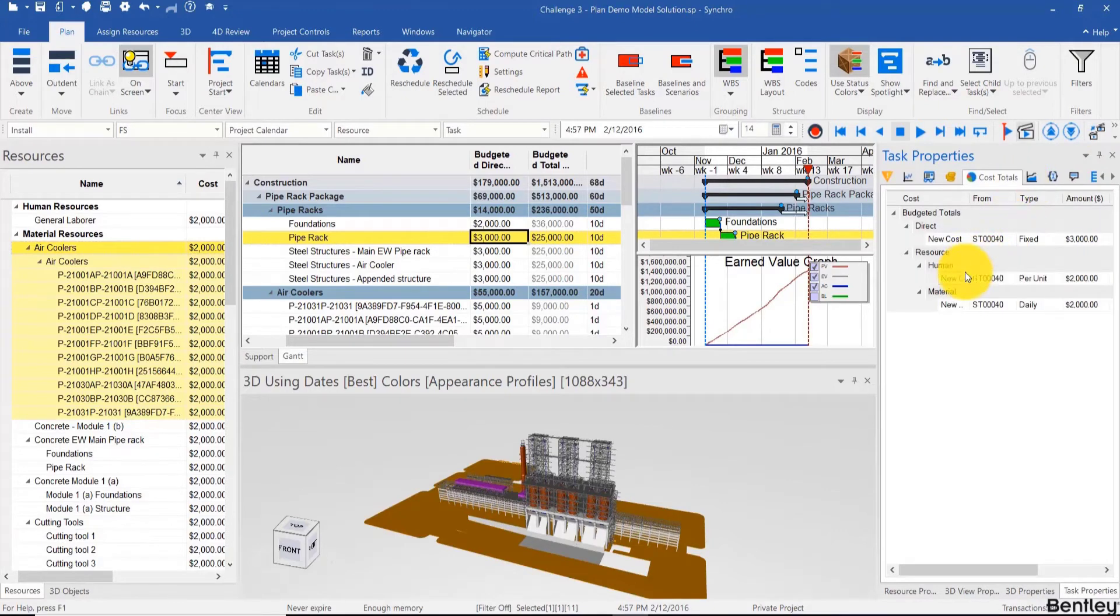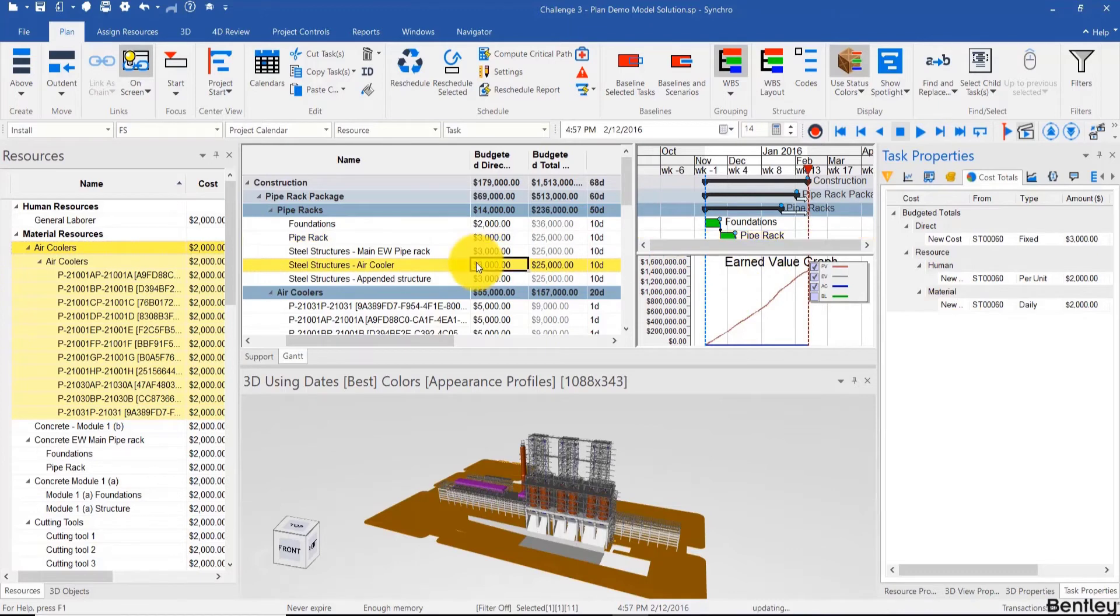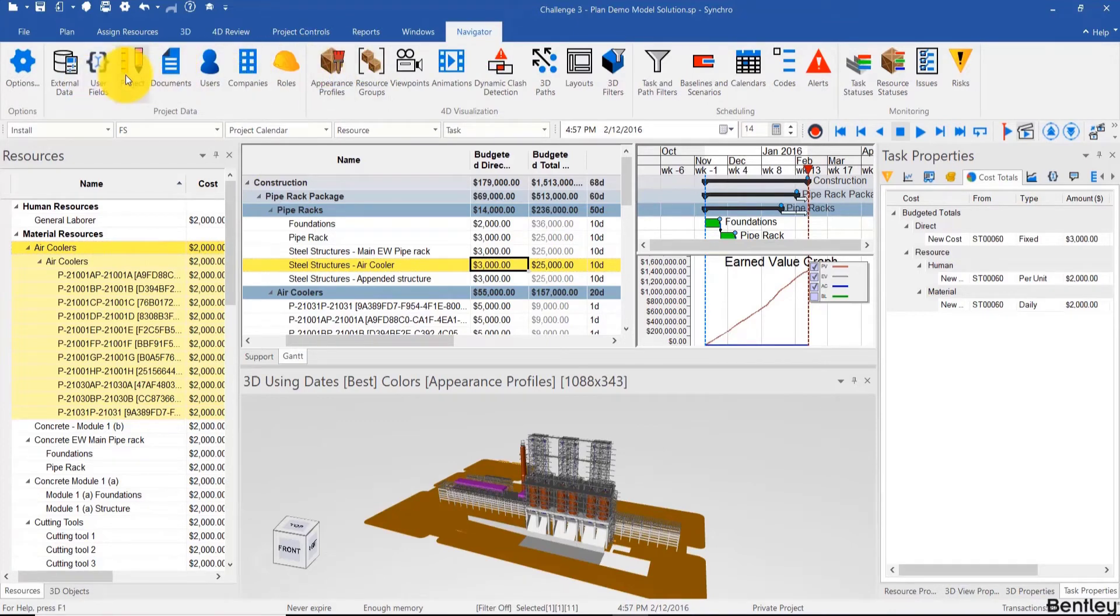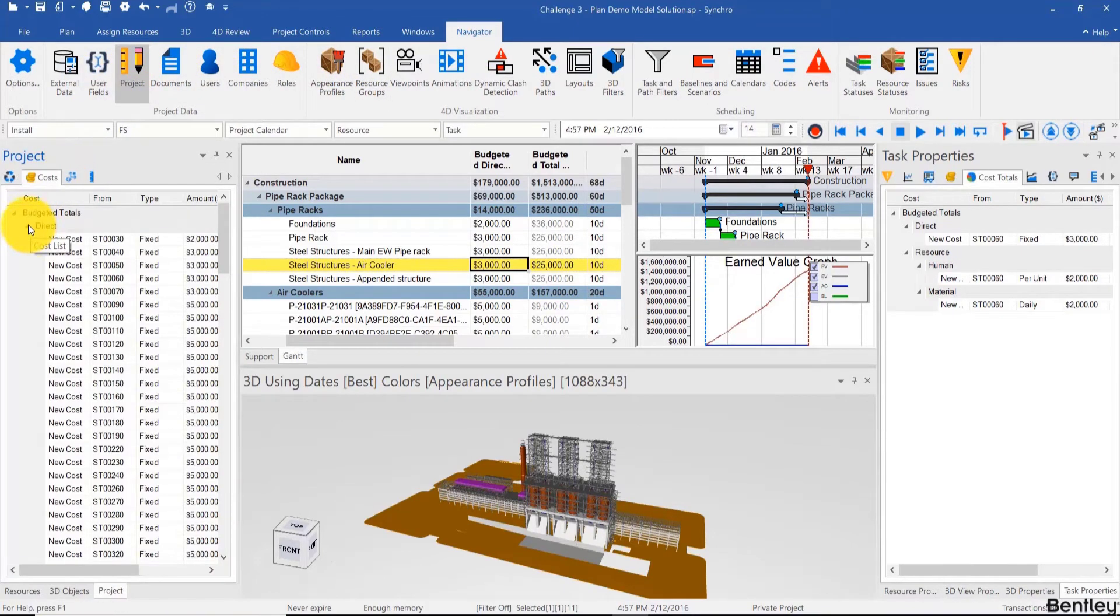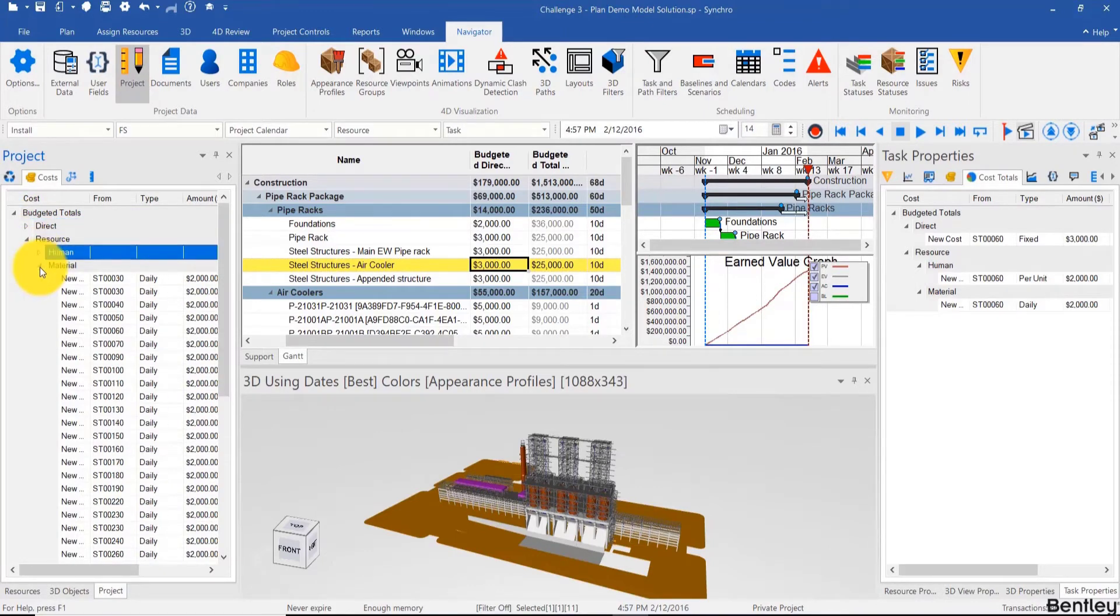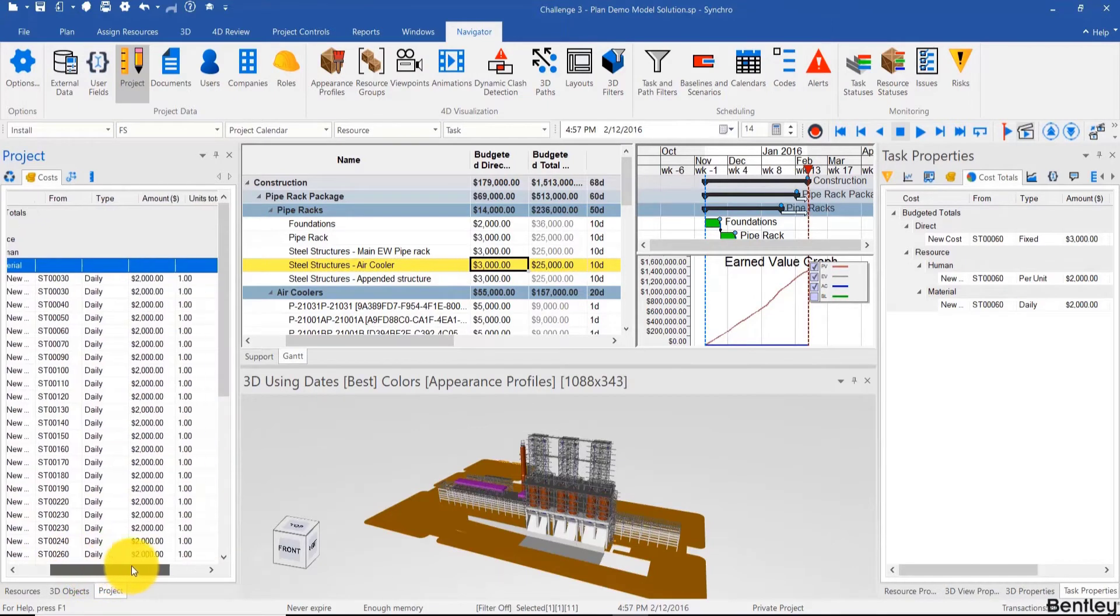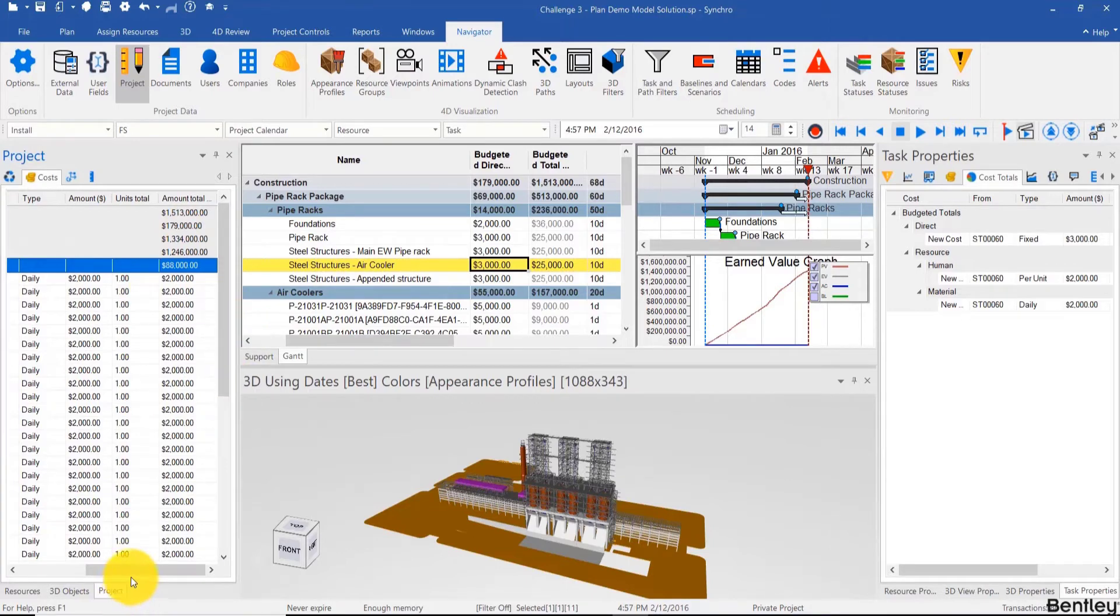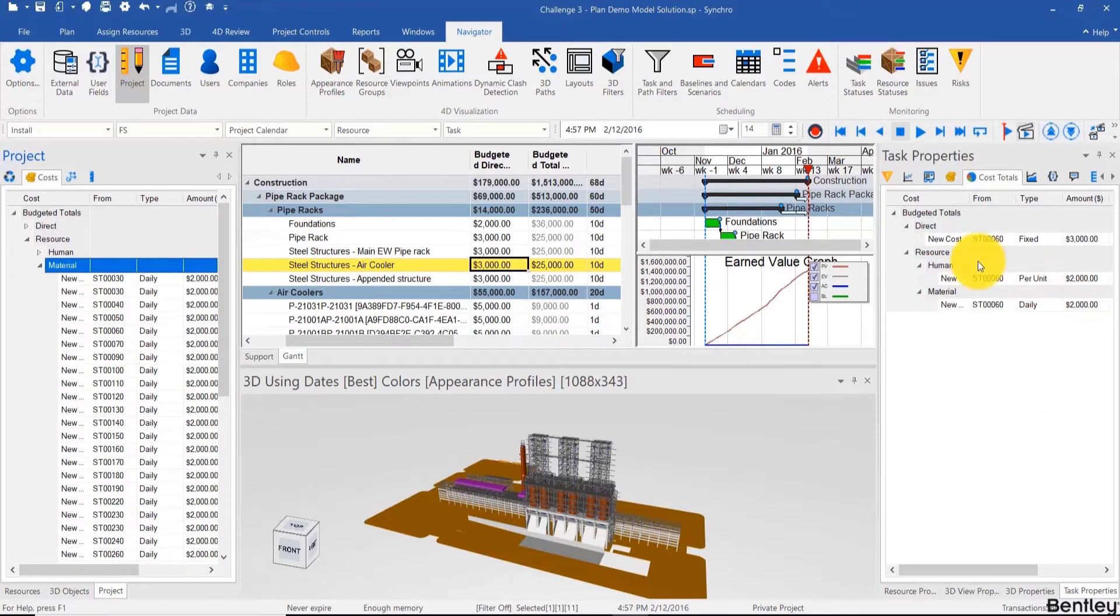So here we see a breakdown of all the direct costs and the resource costs as well and their types. And if we want a breakdown for the entire project, then it's going to be on this side and it's in Navigator, Project, and Costs. We see a breakdown with the direct costs, the resource costs, and the material costs which we just added. And of course if you scroll a bit to the right, you can see the total amounts for each one.